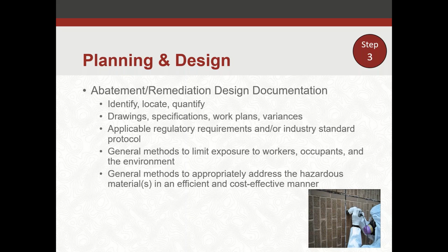Now, we're not specifying specific means and methods, like any other type of work activities. That's going to be more the contractor's responsibility, but just give them a general idea. Okay, this is where we're headed. This is what you're up against. This is how we want to try to address it, generally speaking.